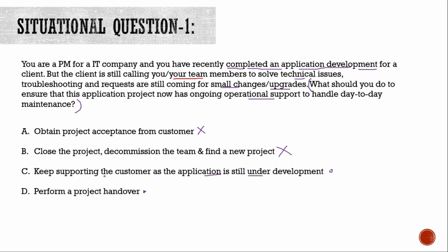Now, it is not acceptable or not as per project management norms to keep on supporting the customer for eternity. That cannot happen, right? The project needs to be closed and the project manager needs to move on to other projects, right? So that is why option C is also wrong. And option D is the correct answer, which is perform a project handover. And by that, it means that you should perform a project handover to the operational department.